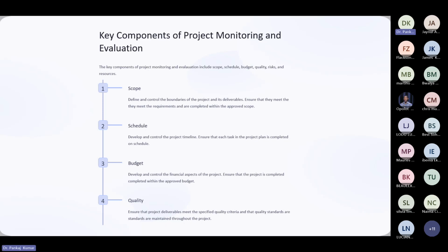We can also identify the critical path, which is the sequence of tasks that determines the project's shortest possible duration. Any delay on the critical path will directly impact the project's overall timeline.